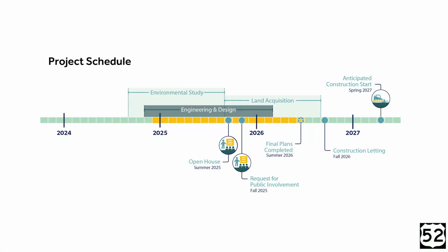The design began in the fall of 2024 with an environmental study. The open house is being conducted summer 2025, with the final project design plans expected to be completed in the summer of 2026. The anticipated start of construction is scheduled for spring 2027.